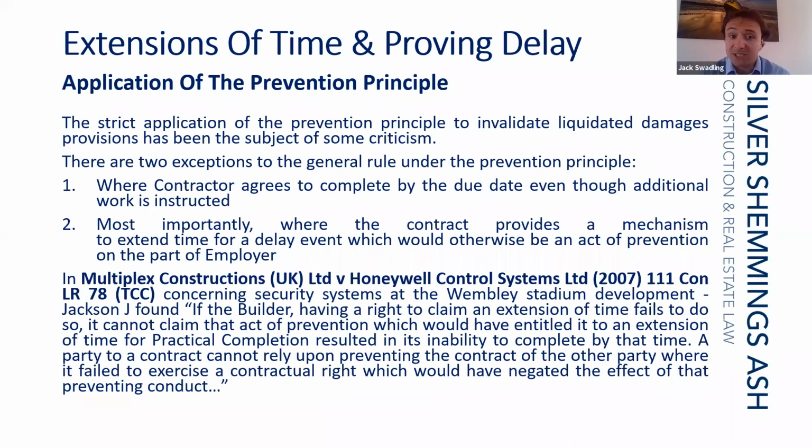But as mentioned, secondly, and most importantly, time will not be put at large under the prevention principle if the contract contains an extension of time provision which provides a mechanism to the contractor to seek additional time as a result of whatever action has been taken by the employer that has delayed the work.